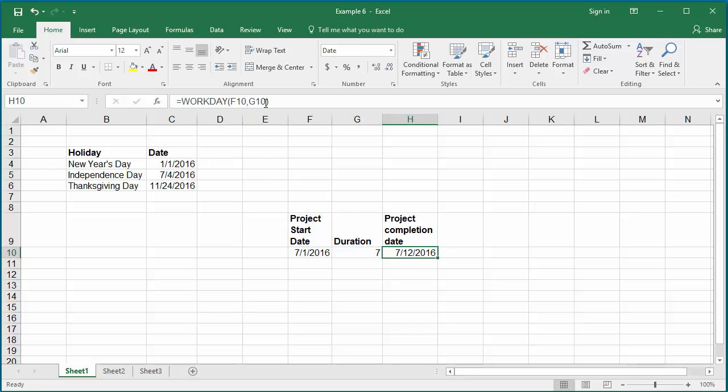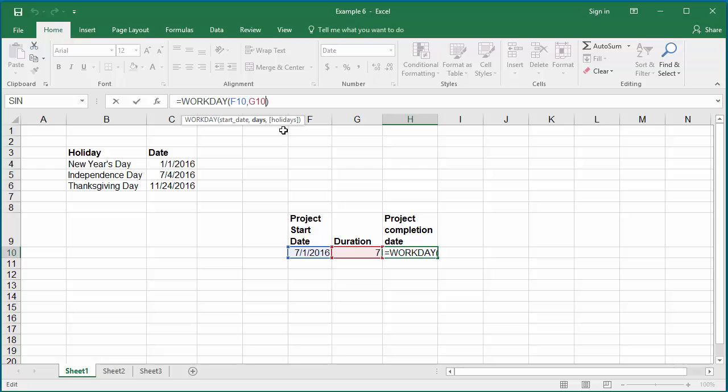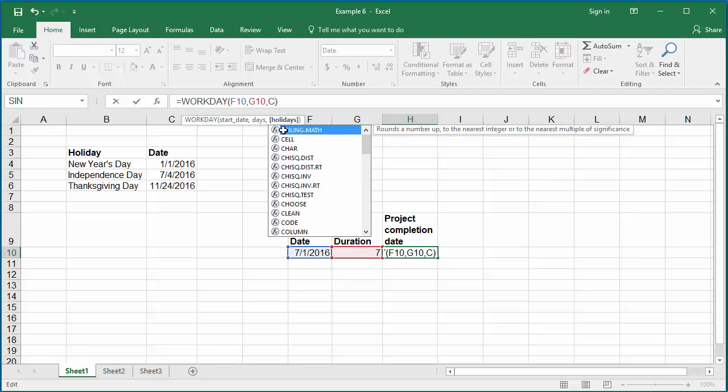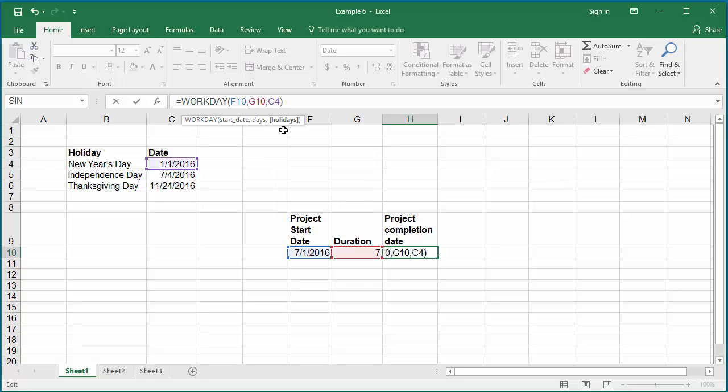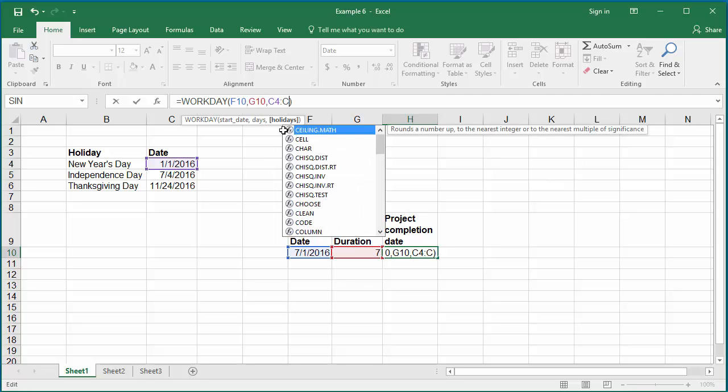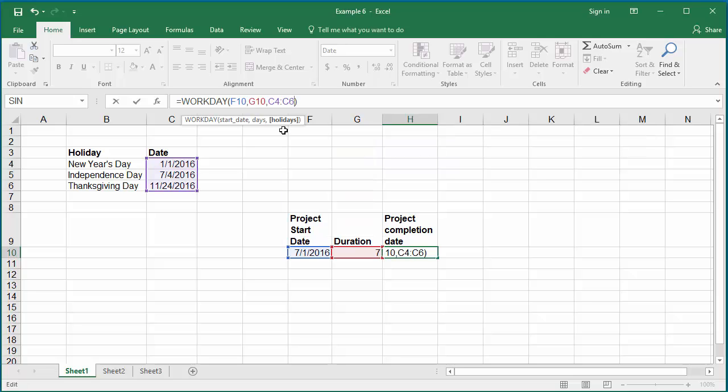In the formula, after cell G10, put a comma and enter the cell range which contains the holidays, C4 to C6. Hit enter.